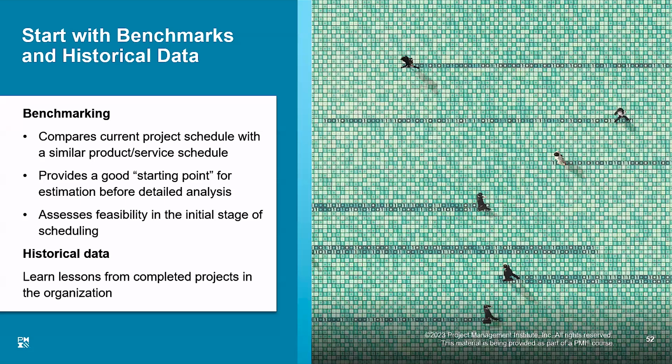List of activities is based on the WBS work packages, right? Every work package will have a couple of activities. For all the linked activities, it has to be in sequence. And after sequence, you have to find out how much time is going to be taken: 1 week, 10 days, 5 days. And after that, you have to draw a final Excel sheet, what I showed to you. You can use a tool also, you can use an Excel sheet also. So this is about the data, right? And benchmark, why I'm saying, because if you have done a 5-year-old project like that, this will not work today, right? So you have to see what is the latest.